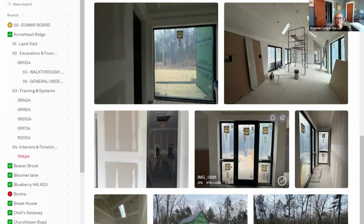Amazing. So basically for a 3-bed, 2.5-bath house at roughly 1,800 square feet, 2-car carport, and then an ADU that technically could sleep probably 6 people. There's space up top in the loft and then a full designated bedroom on the ground floor. But basically from groundbreaking to turning over the keys, it will be less than a year for sure. It'll be probably like 9 months, which is pretty impressive.